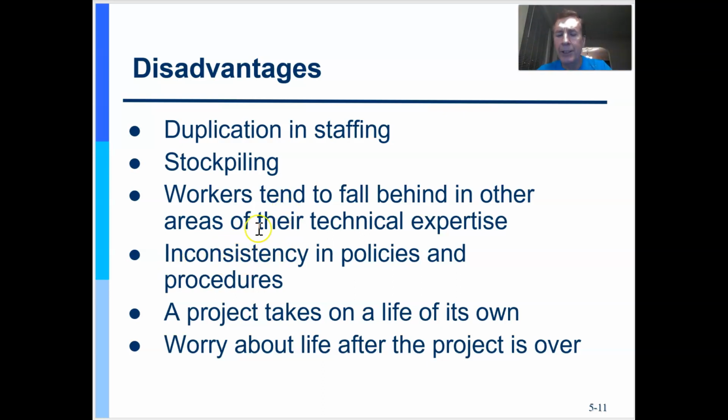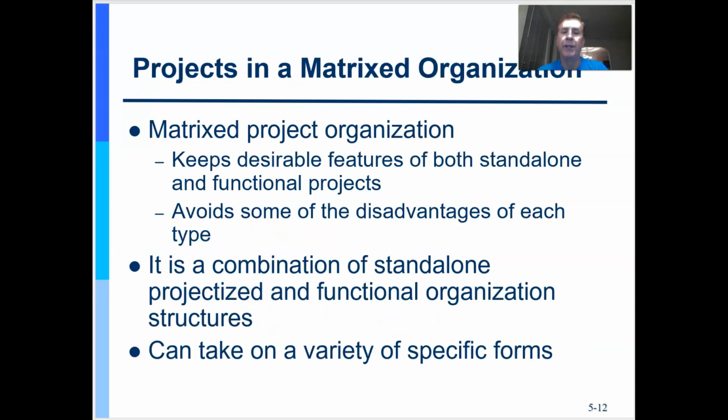Because there are various projects, there can sometimes be inconsistent policies. I find that most of these disadvantages, like the stockpiling of resources, go away when a projectized organization works with a PMO, a project management office, at the top. They will help manage the staffing, ensure consistent policies, and make sure the project functions within it.